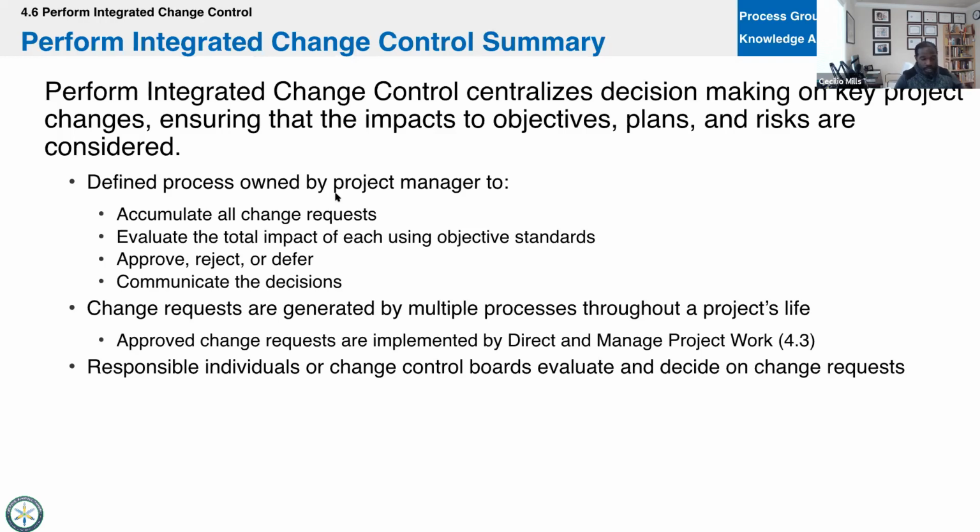All right, so for the exam, just remember that. Scope, schedule, cost baseline, if any of those three need to be changed, then you're going to need to go through change control.